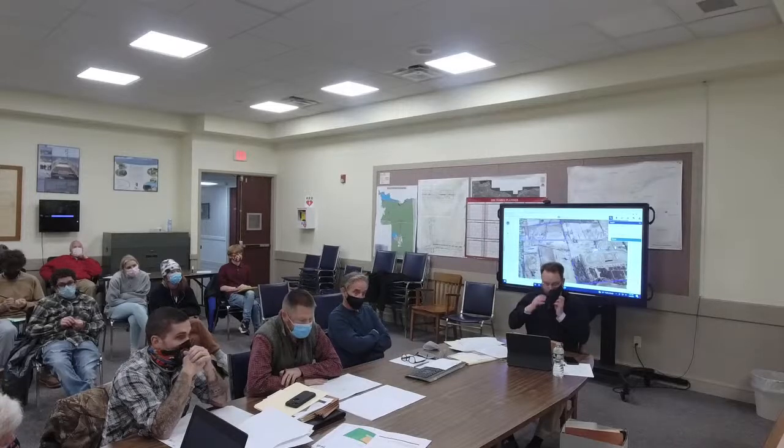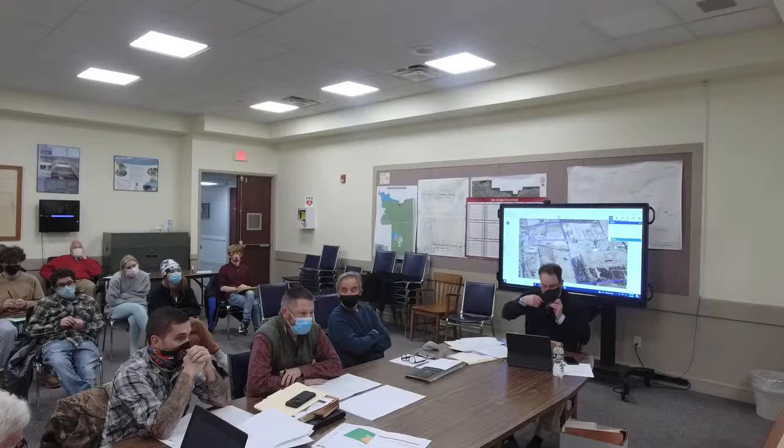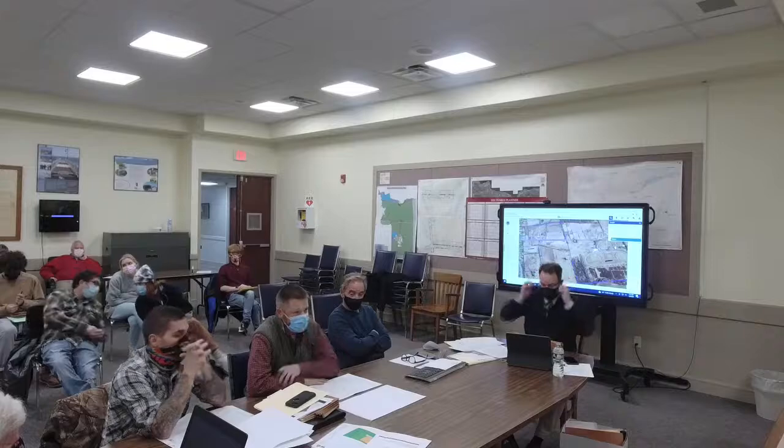I'm asking, the development of a water park and whatever other facility is in here, is that factored into the sanitary system? Yes. And the demand on that system. Yes. And that was part of the discussion with Aaron at the health department when we went and met with them. Ultimately this is going to have to be approved specifically by them. So that discussion was had with them with that package plan. That was assuming the full build out, which is how we came up with the numbers for the package plan. Okay.